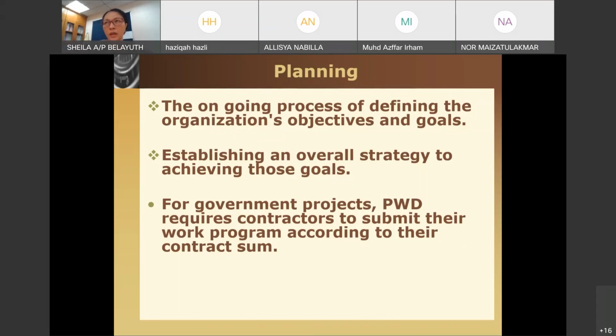Because in construction, you can't get perfect as it is. It's quite difficult for you. Okay, concreting, I want to complete these few slabs. Sometimes it might rain, sometimes you have workers not turning up, sometimes the material is insufficient, sometimes there is misalignment in the installation of rebar. And when there is misinstallation, probably your resident engineer requires you to change it. The defect lah. So you will need to redo the rebar arrangement and so on. Quite a lot of things could take place there.